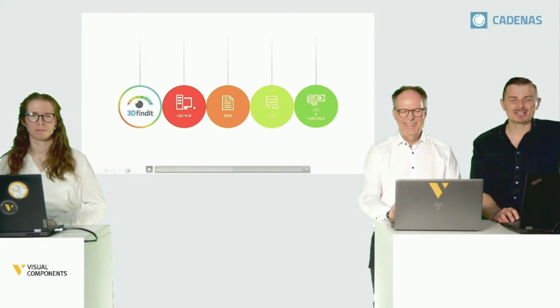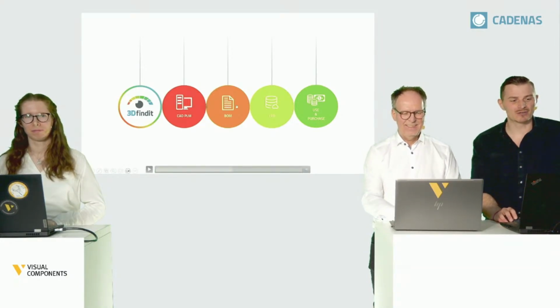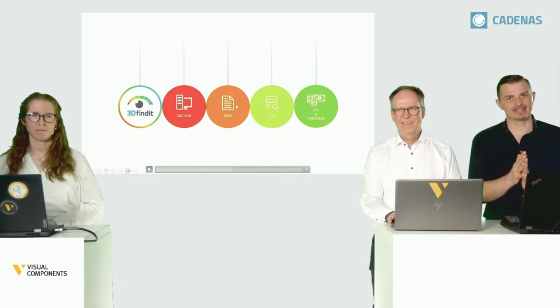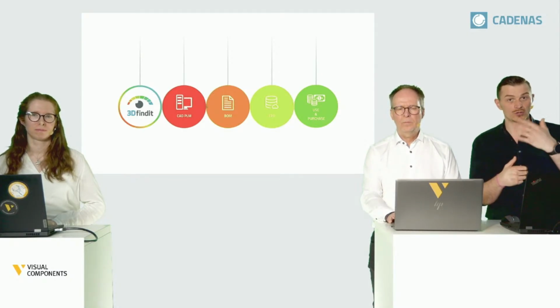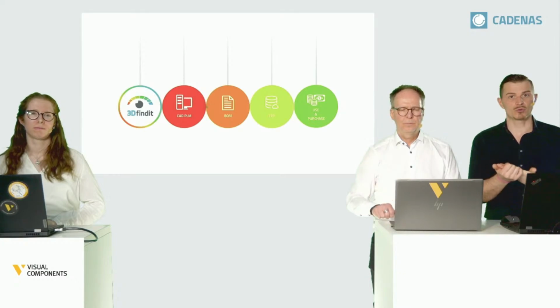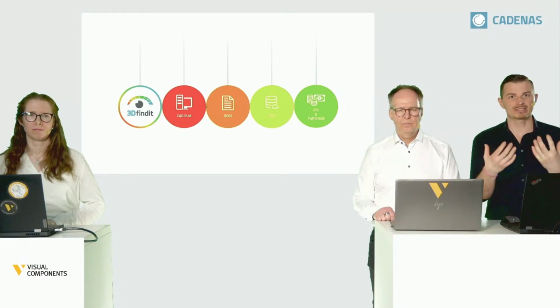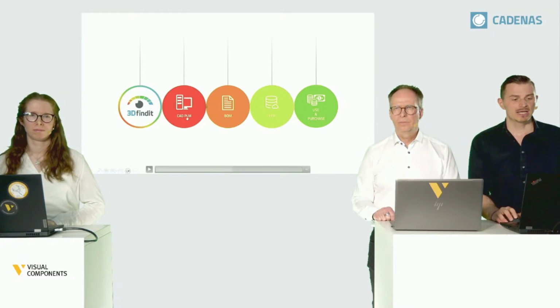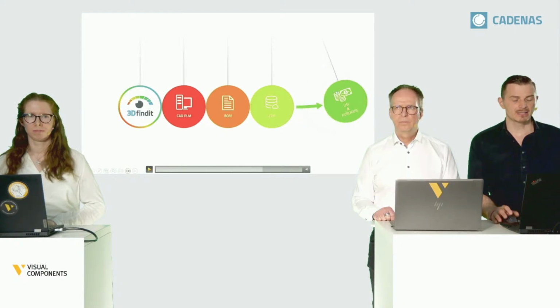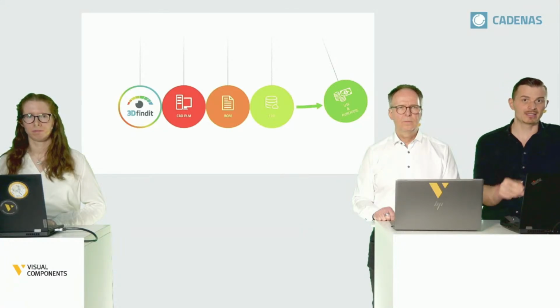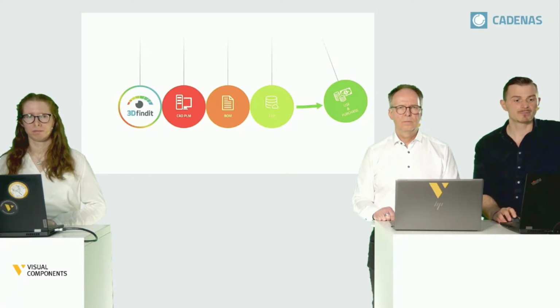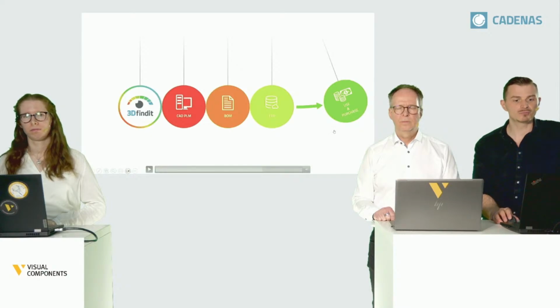And if the planning is finished, there will be a bill of material, a really complete list of the components you're going to need, which is also important for the whole project calculation. So what is the investment for the hardware? And later, as the green shows, the purchasing department will take this bill of material and request the manufacturers who will be suppliers for these projects.